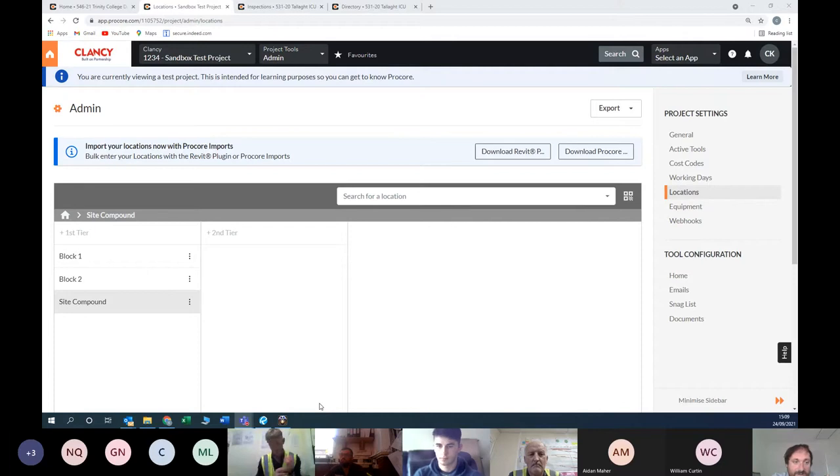There are projects with 14 or 15,000 photos. If you're searching for photos, it's a lot easier to understand that one is associated with a room location, and you can find that very, very easily 6 months down the road, rather than searching through photos one by one. So any of that information is associated with NCRs, RFIs, and so on.